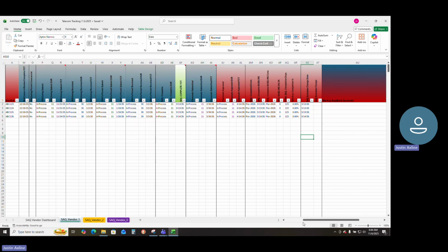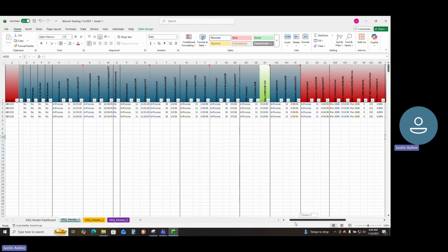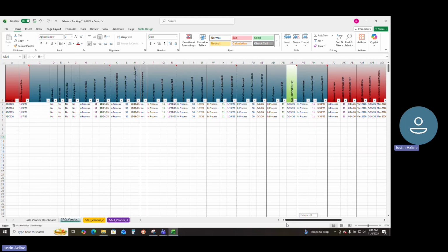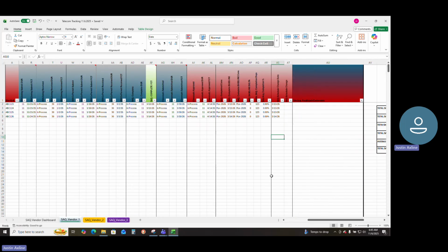These names obviously can change. Let's go through some of the techniques. What's important here is I've programmed a concurrency. With zoning and construction permitting, sometimes those can happen at the same time. That gives it a start-to-start scheduling relationship, which means your zoning and your permitting can start at the same time. All right, and you can see we've got some other metrics out here.